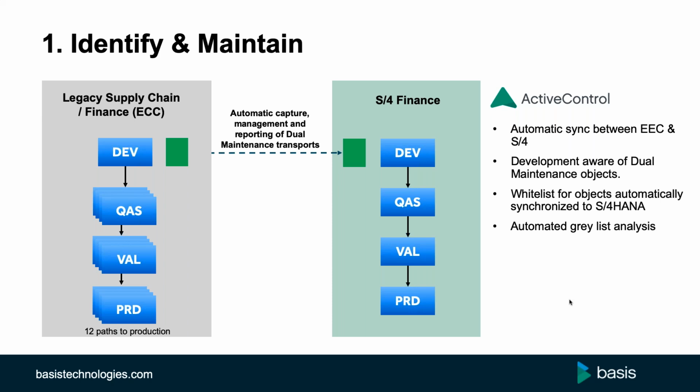However, we obviously also need to recognize that S4 comes with a number of changes to how the data model is evolving and how the configuration has to be done. So in a certain subset of cases, it won't be possible to simply import the ECC transport into the S4 development system, and it will need to be reviewed and maintained manually.